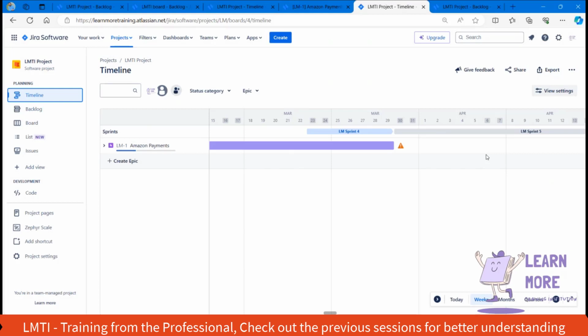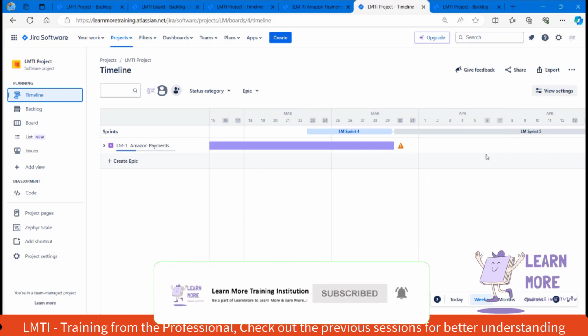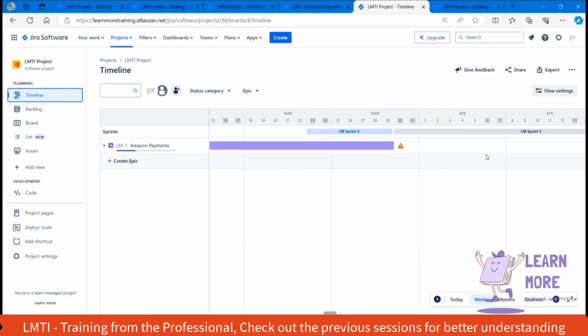Okay, and apart from that, the Scrum Master will also have some other call called a sprint review call, or we can call it a mid iteration check. So I told you the sprint is also called an iteration. So if you have a 15-day sprint, in the middle of the sprint the Scrum Master will schedule a call and check whether we are good to complete all the planned user stories. So if we have any complexity, we should highlight it during that call, and we should not highlight it at the end of the sprint.